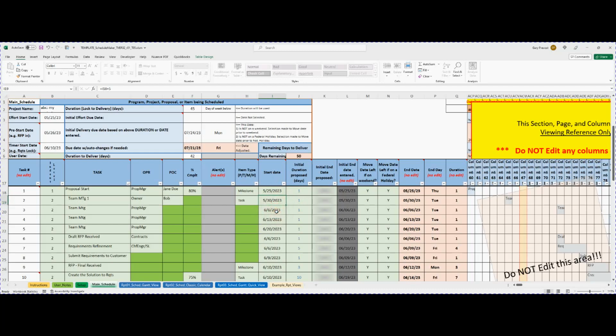Now let's say from that date I want every 7 days. So I can click on the next meeting date. Remember, we're looking at this row for meetings. I don't want to say every Tuesday, so I can say equals this date plus 7. And then I can keep replicating that: equals the date above me, the previous meeting, plus 7. I can keep doing that for all the meetings.